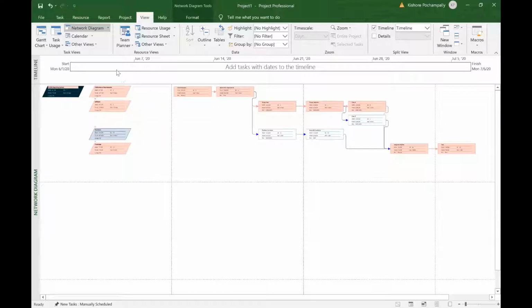These are the level 2 items. And the level 3 items are what are shown on the network diagram, because only for those we entered the predecessors. You can guess what this red path is. It's the critical path. And notice that this one right here, the hardware deliverable, is blue, and the other 3 on level 2 are red, because the hardware deliverable does not have any child on the critical path. And the other ones are red because at least one child of those is on the critical path.